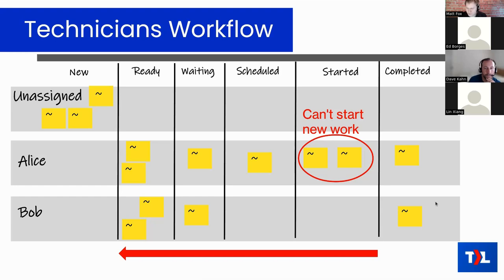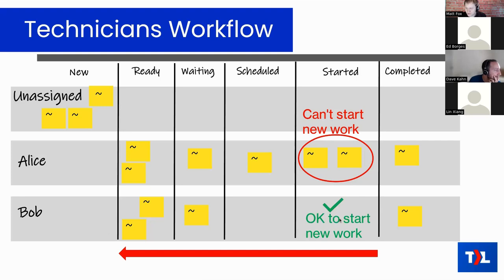For Bob, who has no tickets in started, he is free to start new work. He looks at scheduled — nothing there that needs doing now — then checks the waiting column — nothing is ready to work on. So he goes to the ready column, picks what's at the top, drags it to started, and begins working on it. That is how Bob would work.